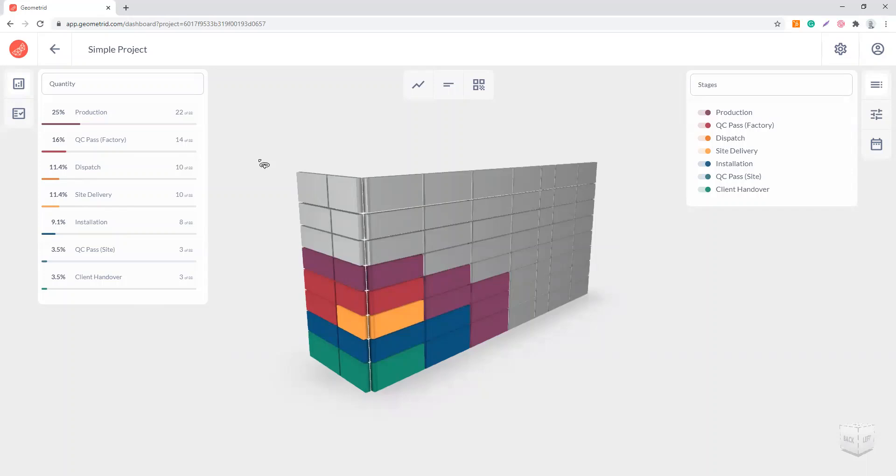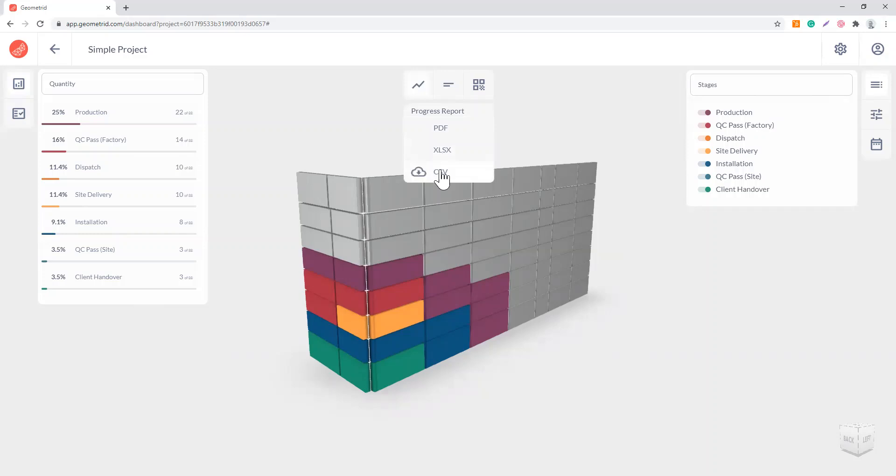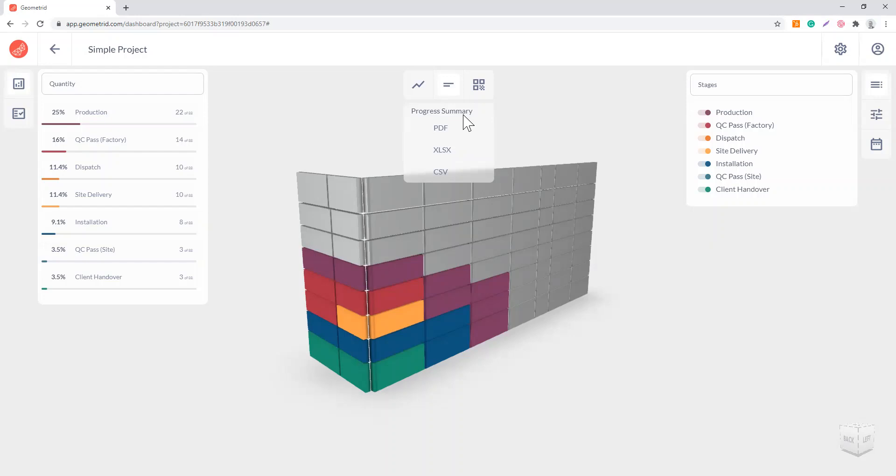From here you can download your progress reports. I will show you later how to do some filtering, but basically if you don't make any changes, once you click here you can download your progress report for all the elements in PDF, Excel, and CSV format. This is the progress summary where you will get a list of all the things completed for either the entire project or for some selection.